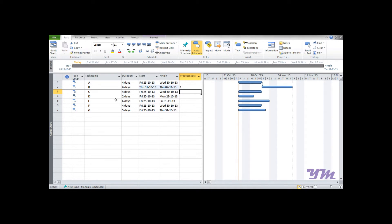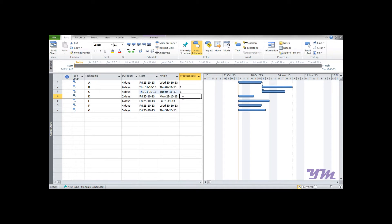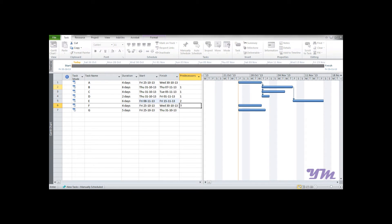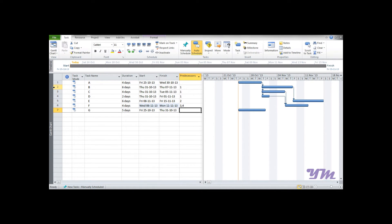Similarly, if Activity C and D are also preceded by Activity A, write 1 in their predecessors column. Activity E is preceded by Activity B, so write 2. For Activity F, which is preceded by both C and D, write 3,4. For Activity G, preceded by both E and F, write 5,6. Once you press Enter, the relationships are automatically drawn on the chart.